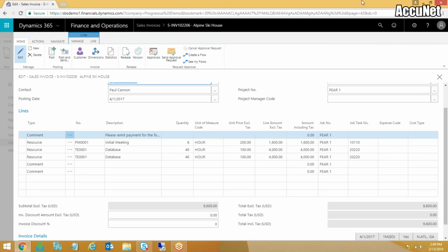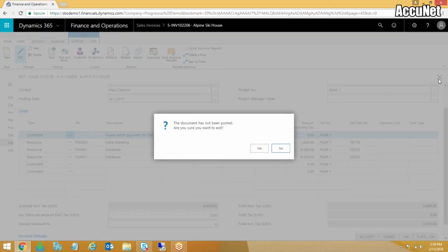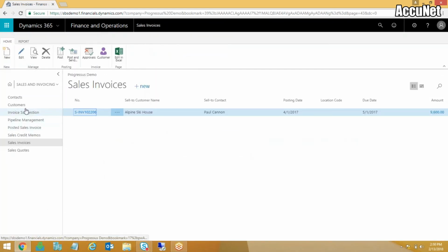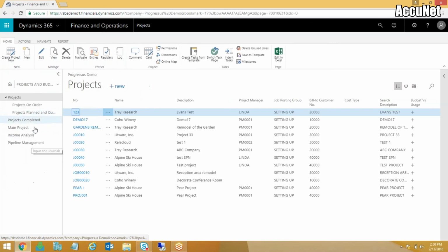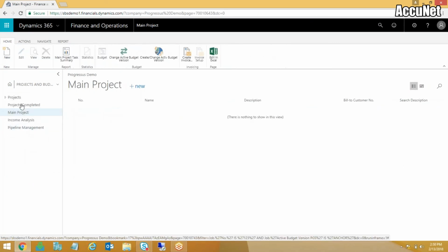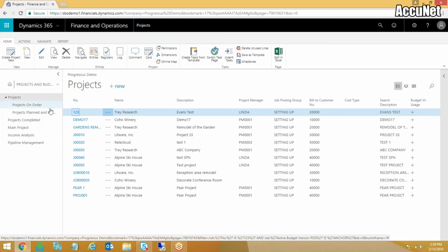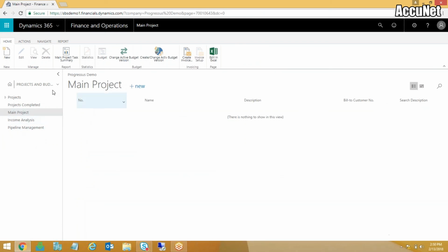Okay, I want to take 2 more minutes and show you one more thing. We have one other thing called a main project, and this is something that a lot of customers like, so I want to spend just 2 minutes on it. We have the idea of a project, but then maybe we want to group some of these projects onto one project for purposes of understanding our total cost. So maybe you have an annual contract with a client and you do statements of work to consume that annual contract. And so you want to be able to have visibility as to what that total is.